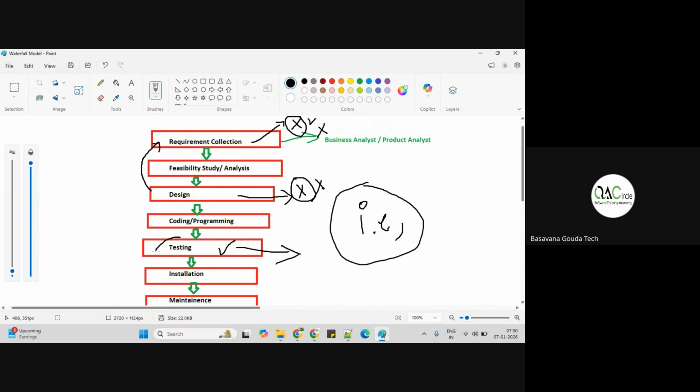Testing is a very small phase in the waterfall model, which is done after coding. Chances are there might be a bug in the requirement collection itself, or in the design itself, so it will go till the end of the product. Here we have invested a lot of money for salaries, office cubicle cost, many things will be involved, right? If we had caught major bugs early, we would have found fewer bugs in testing.